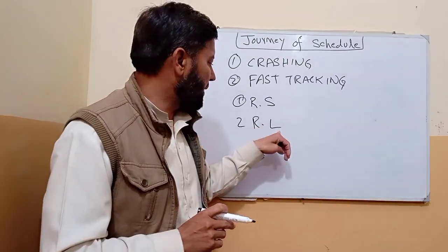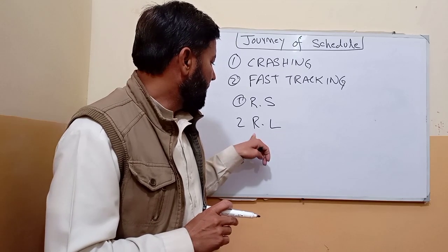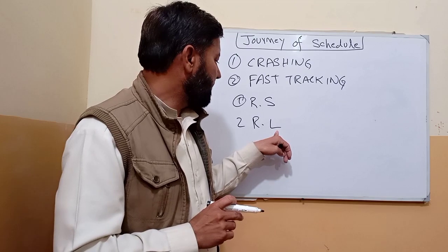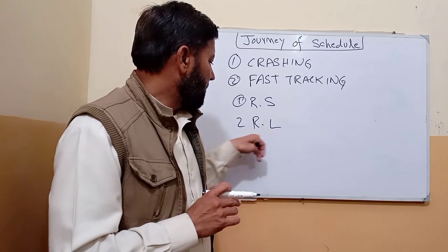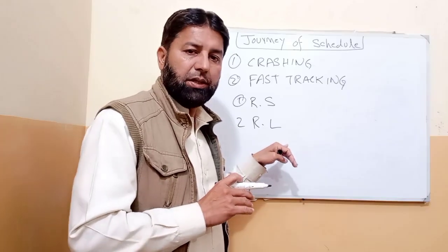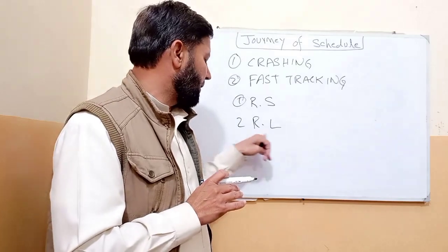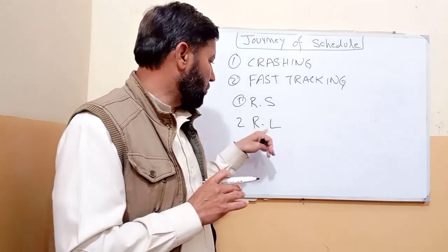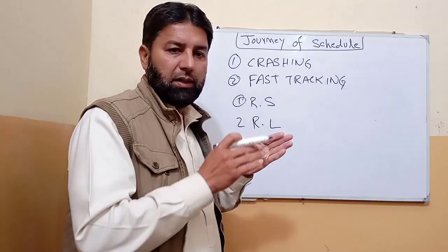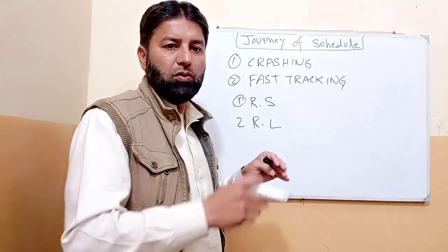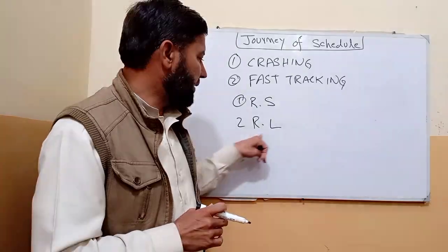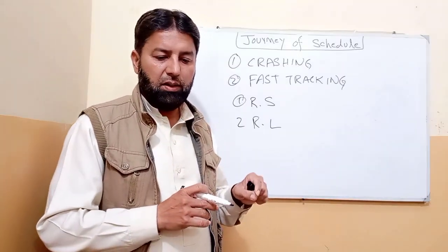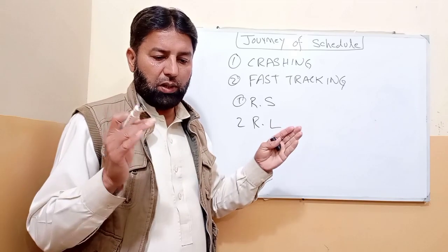But in resource leveling, we will increase the schedule and adjust the resources. The baseline will be revised in resource leveling, because of resource leveling we increase the schedule.